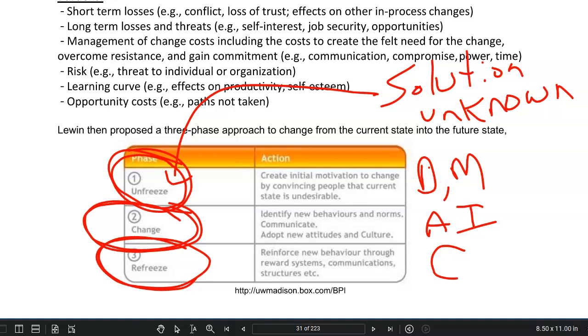And we're now telling folks that this new, better way isn't an option anymore. It has been shown to be a better way. The new way is the way. We call it the refreezing of future state. So first we communicate unfreeze, a change is going to happen. Then we communicate once we know what the specifics of the change initiative are, the details behind it, changes happening now. Here are the specifics and here are how you can help. And then after the change has been shown to make a better future state in the refreeze, we lock it in, explaining why this new better way is now the way.